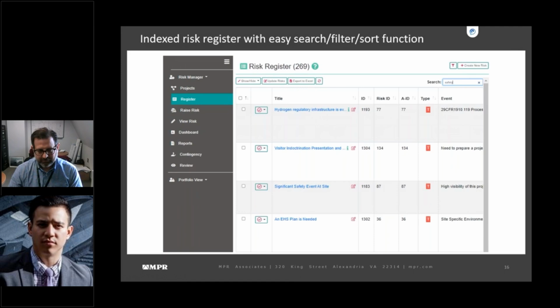There was some front-end effort involved with getting this risk register fully populated and migrated over, and I think that was where we were in the project evolution. We were trying to stand up a risk program right before construction was starting, which is not a place you want to be.